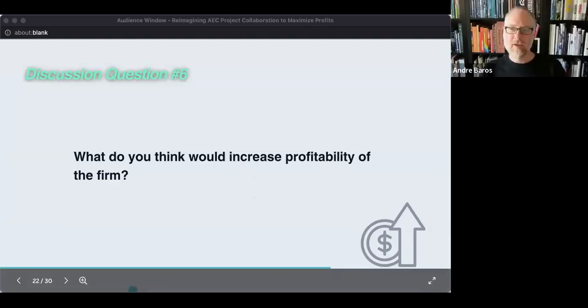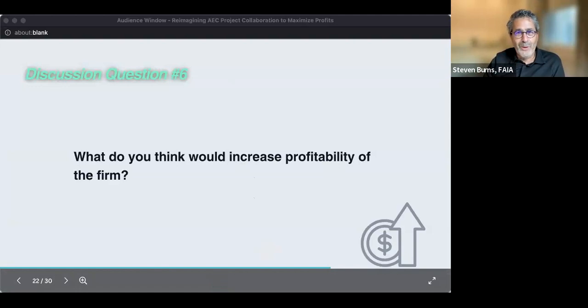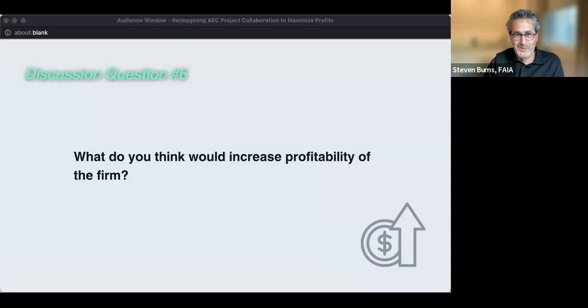I'd like to broaden this maybe. Certainly planning and monitoring, as 57% say, is essential. But I'd like to say stop waste is probably the easiest win to increase profitability. And that is best handled through pre-design, where most firms don't engage in pre-design, but that's where all team members, the client, the consultants, even the builder, the design team, everybody gets in early, and then they get an absolutely clear understanding of the budget and the scope, the intentions of the client, and all these other kinds of requirements from the owner.